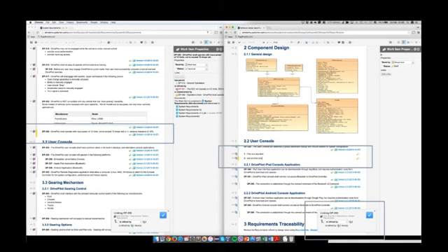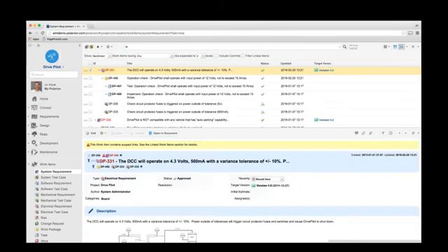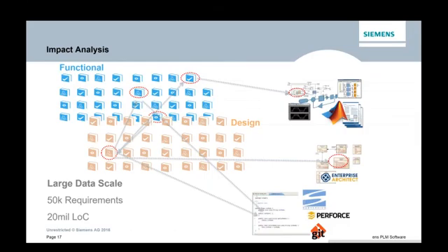Of course, later, if you're saying that you speak more about agile development, and the change could happen anytime when the system requirement is being changed, I'll be notified instantly that I should adjust the design requirements through suspect links or some kind of mechanism. Why is it so important to really connect the functional requirements to the design solution requirements at the end?